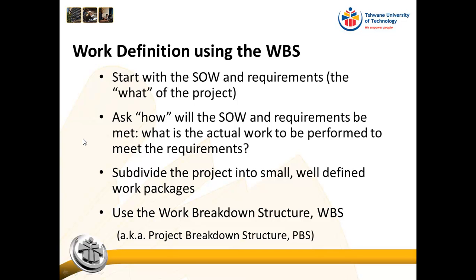So then ask, how will the statement of work and the requirements be met? So what is the actual work to be performed to meet the requirements? Then you subdivide the project into small, well-defined work packages. And you use a work breakdown structure or a WBS. So from now on, I'm going to use WBS because it's just quicker and easier to say.